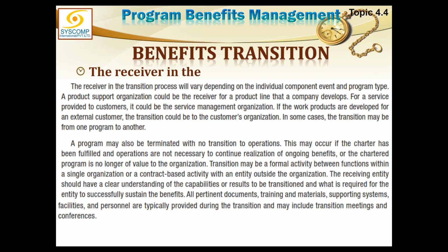So maybe there was a program to, say, carry out the census activity. Once the census has been done, the program will be closed and the results at the end would be shared with the statistics department. So there is nothing else to be transitioned. There is no ongoing operation of this thing. We have given the data to them. So in such cases, the transition would be just the data.